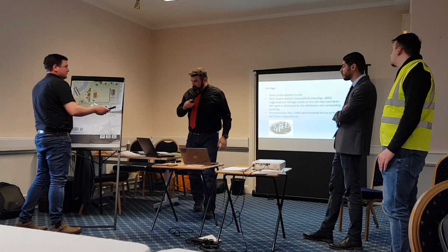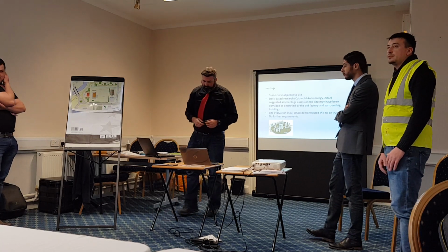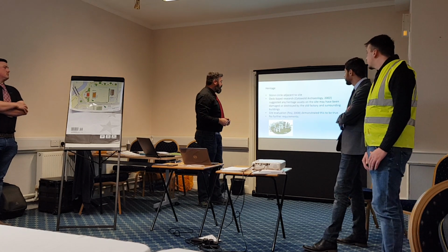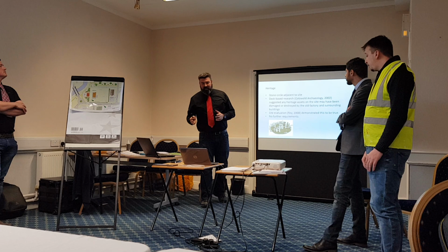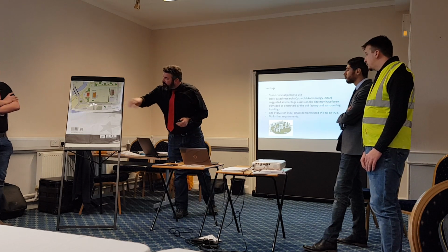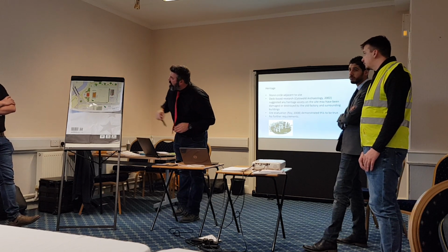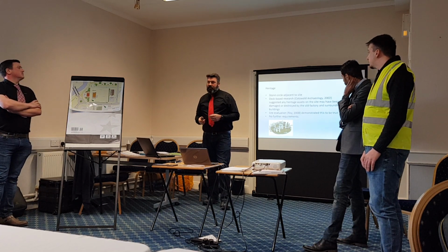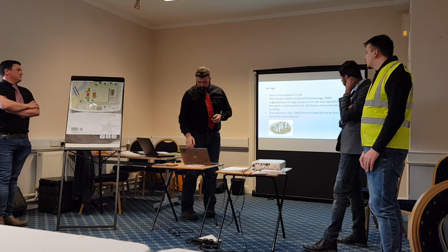A keen-eyed among you will have noticed that there is a small stone circle just outside the site. So in terms of heritage, we've looked into this to see if there are any restraints here. Desk-based research was carried out in 2002 by Oxford Archaeology, suggesting that the site, due to the building of earlier factories on site through here, and also the development of the Riverside Cafe, had previously disturbed any remains. Evaluation was undertaken during the building of the cafe, and this was proven to be true, so no further requirements on the heritage side.